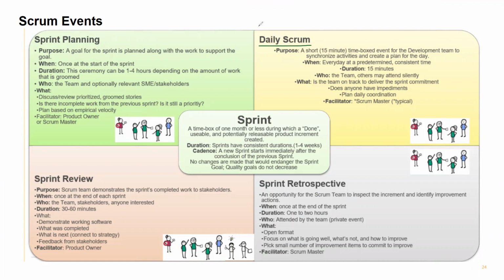If you are talking about the daily Scrum, this is one meeting name, and it is for 15 minutes. Sprint planning is between 1 hour and 4 hours based on your sprint cadence. Do you understand? Only the daily Scrum is for 15 minutes, not every meeting. Every Scrum meeting has its own time. Do not get confused. Only the daily Scrum is for 15 minutes.